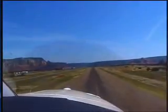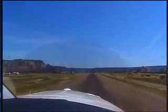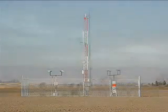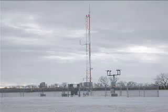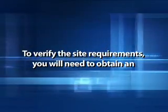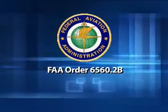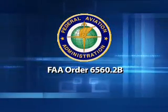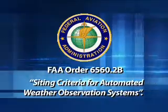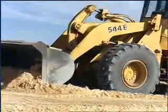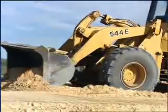Once you determine an AWOS is a desirable addition for your airport, you will first want to ensure that your facility has the right layout to utilize a working AWOS. To verify the site requirements, you will need to obtain an Airport Layout Plan by referring to FAA Order 6560.2b, Siting Criteria for Automated Weather Observation Systems.